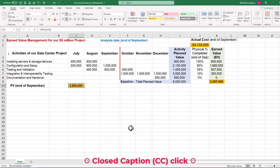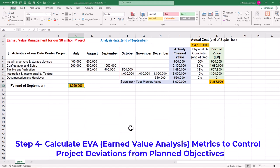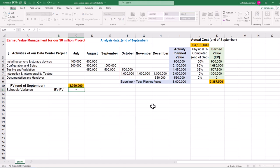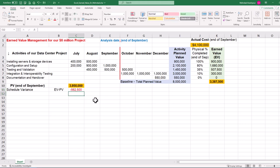This concludes the third step in project earned value management using Excel. Step four is to calculate EVA metrics to control project deviations from planned objectives. Schedule variance or SV is typically calculated in dollar values to integrate cost and schedule performance metrics. We can find SV by clicking on the relevant cell, pressing the equal sign, choosing EV, then deducting PV from the end of September. The negative SV shows deviations from the planned project schedule, meaning that our data center project is experiencing delays in achieving project milestones.